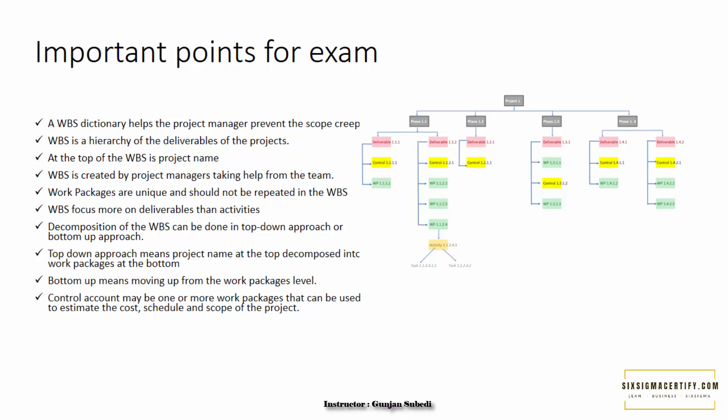WBS work packages do not show dependency on each other. At the top of the WBS is always the project name, which is then decomposed into deliverables, work packages, activities, and tasks. Work packages are unique and should not be repeated in the work breakdown structure — you should not have similar or duplicate work packages in a project. Deliverables are more important than activities in any work breakdown structure.